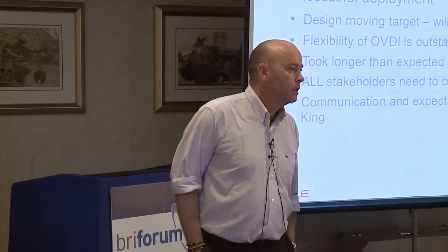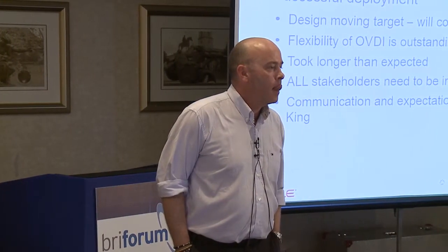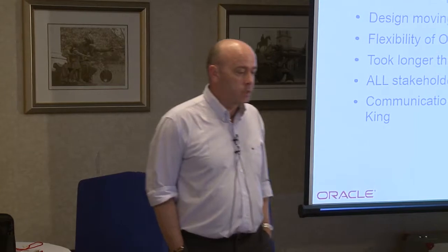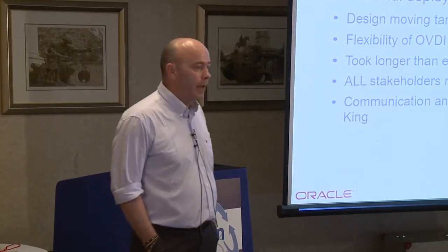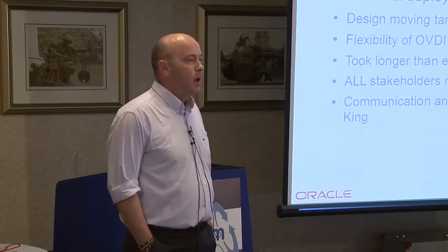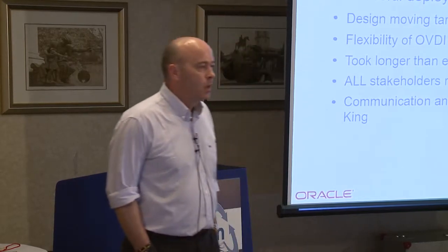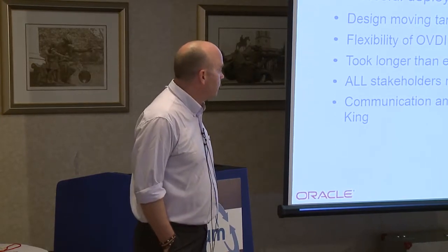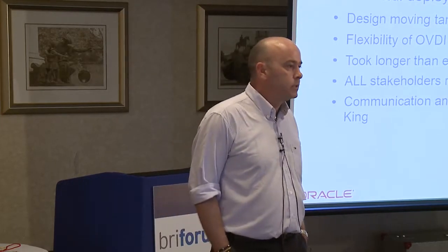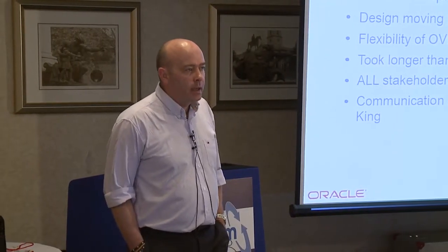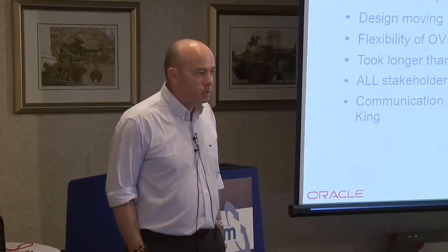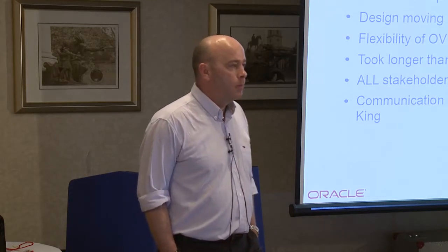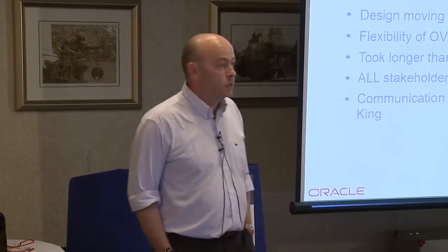Was there any kind of push to say, why are we doing VDI, why don't we use terminal services? Yeah, and that's one of the big pushes that we get in a lot of the deployments that we're talking to customers about at the moment. It was identified early on that remote desktop services, because of the amount of bizarre legacy apps that they had, wasn't going to fit this council deployment. We've done another one further up north where they've gone for remote desktop services. We think we're going to get 70% of their users on RDS, but they've just come back going, yeah, we're struggling now. We need probably 200 or 300 seats of VDI. So it's part of that initial expectation management.